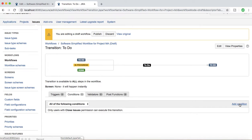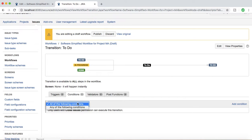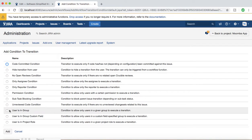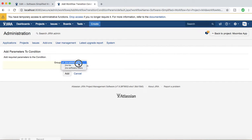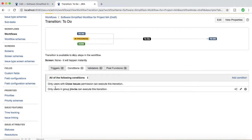You can add multiple conditions and choose All or Any of the following. Choosing All of the following is essentially an AND condition; choosing Any of the following is an OR condition — meaning if either condition is met, the person can transition the issue. For example, if you add a second condition requiring the user to be in the Jira BA group, then the user must have Close Issues permission AND be part of the Jira BA group to transition the issue. That's what conditions are all about in the advanced Jira workflow.